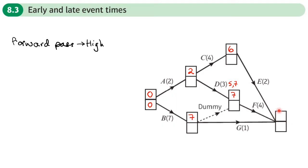For the sink node at the end, we write down the different values from each route. Via activity C we add two more, giving eight. Another route gives seven plus four, which is eleven units of time. Via activity B (seven) and G (one), that's nine units of time. The earliest we can finish is when everyone's finished, so we take the highest value, which is 11. So 11 goes in the sink node.